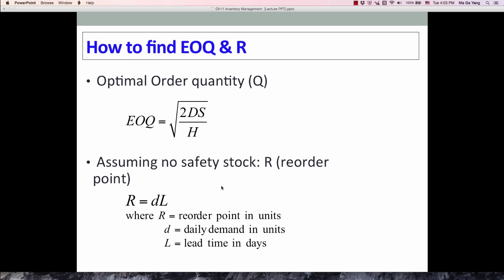So when you sum up, economic order quantity or Q or optimum order quantity equals square root 2 times D times S divided by H. And then assuming that there is no safety stock, our reorder point equals daily demand times lead time in days.